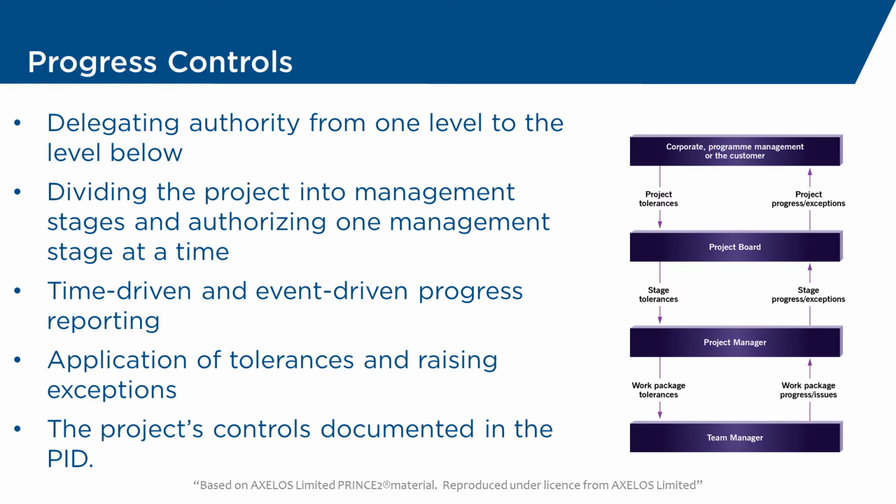These are both time driven, so they're frequent. Once a week, perhaps from the team manager, once a month, perhaps from the project manager up to the project board, as an example. There are also event-driven controls. So this may be as a result of a particular event occurring, such as an issue, or perhaps it's an exception. Then these would be reported as well.